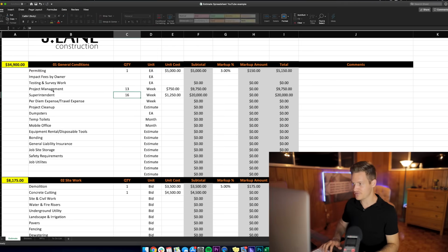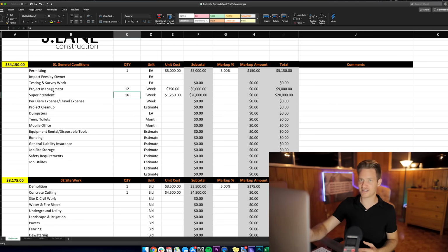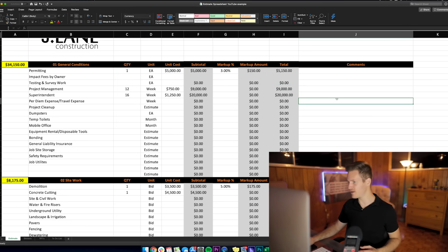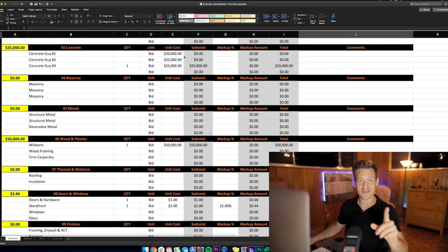But the project manager isn't going to be on just this one project. The project manager is in your office, my office, running 3 or 4 different projects at the same time, and he's not all the time focused on this. So I might even drop this down to call it 12 weeks, and 16 weeks for the superintendent. That gives me a total cost here of $29,000 extra dollars for project manager and superintendent. Now, here's the good part.